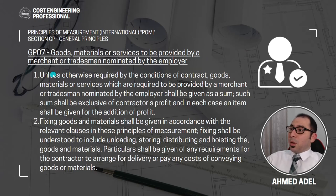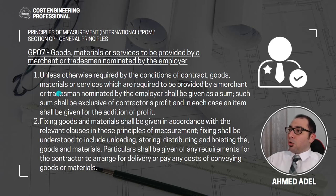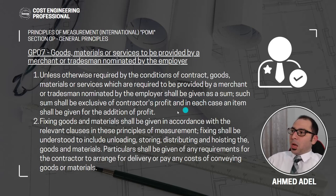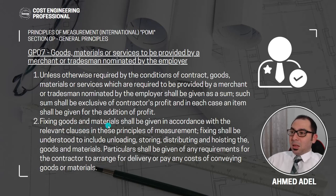Subsection 7: goods, materials, or services to be provided by a merchant or tradesman nominated by the employer. Unless otherwise required by the conditions of contract, goods, materials, or services required to be provided by a merchant or tradesman nominated by the employer shall be given as a sum. Such sum shall be exclusive of contractor's profit, and in each case an item shall be given for the addition of profit. Fixing of goods and materials shall be given in accordance with the relevant clauses in these principles of measurement.